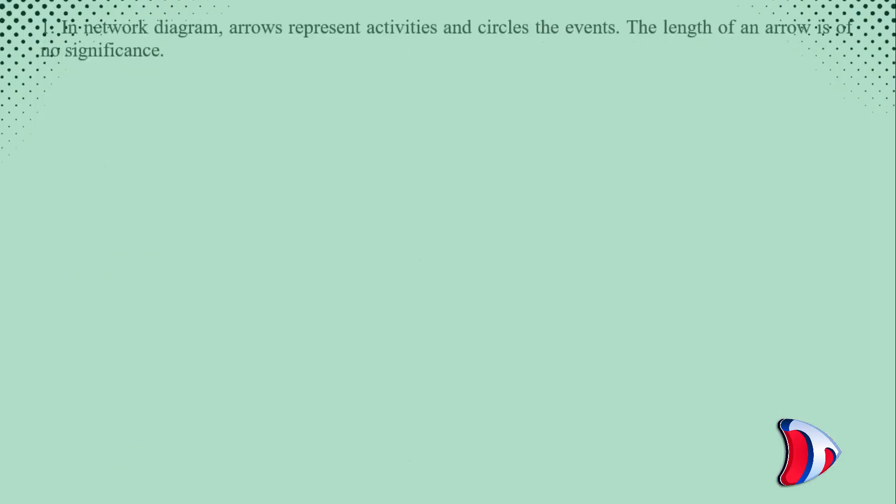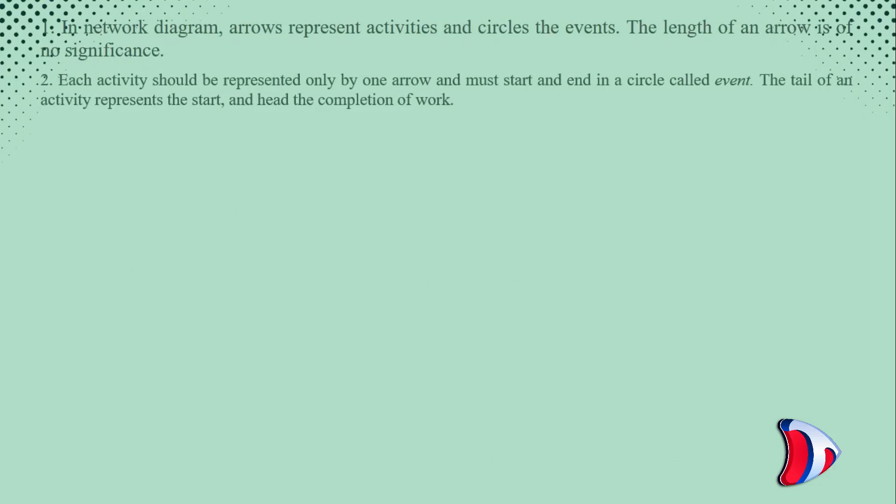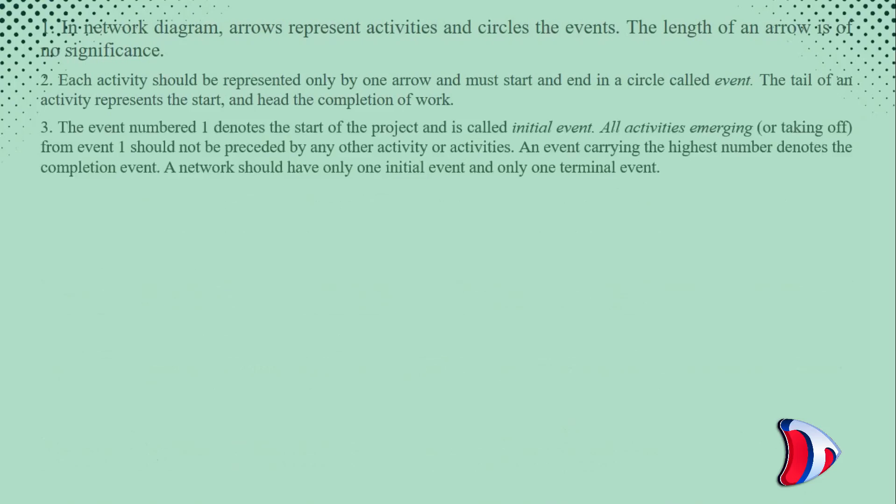In network diagram arrows represent activities and circles the events. The length of an arrow is of no significance. Each activity should be represented only by one arrow and must start and end in a circle called event. The tail of an activity represents the start and head the completion of work.